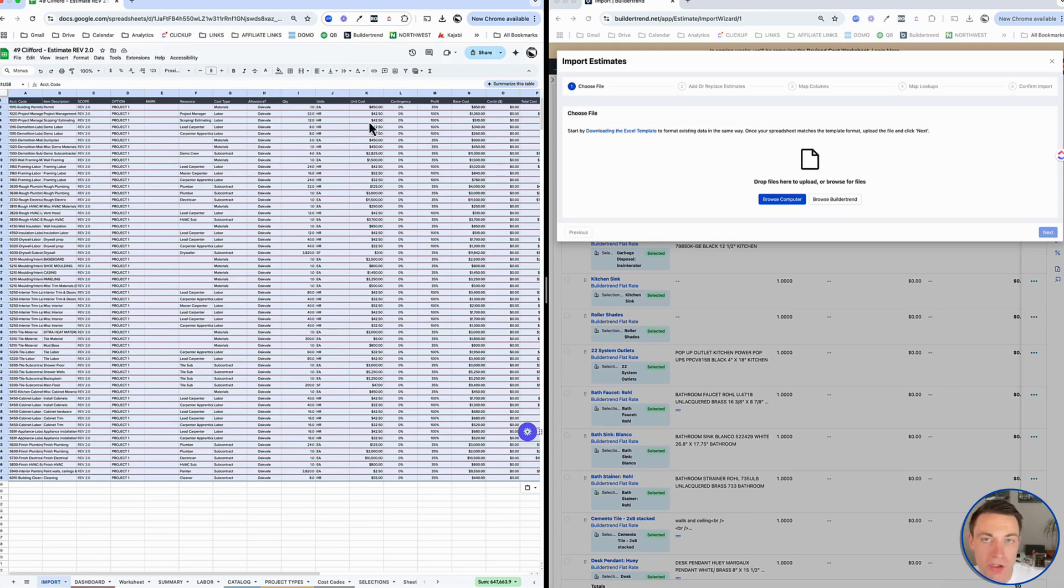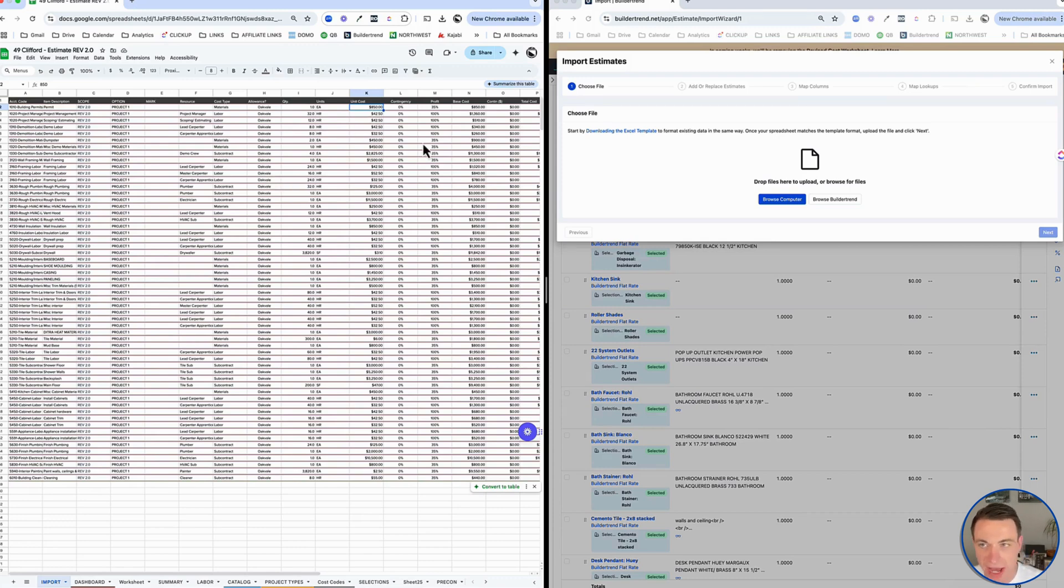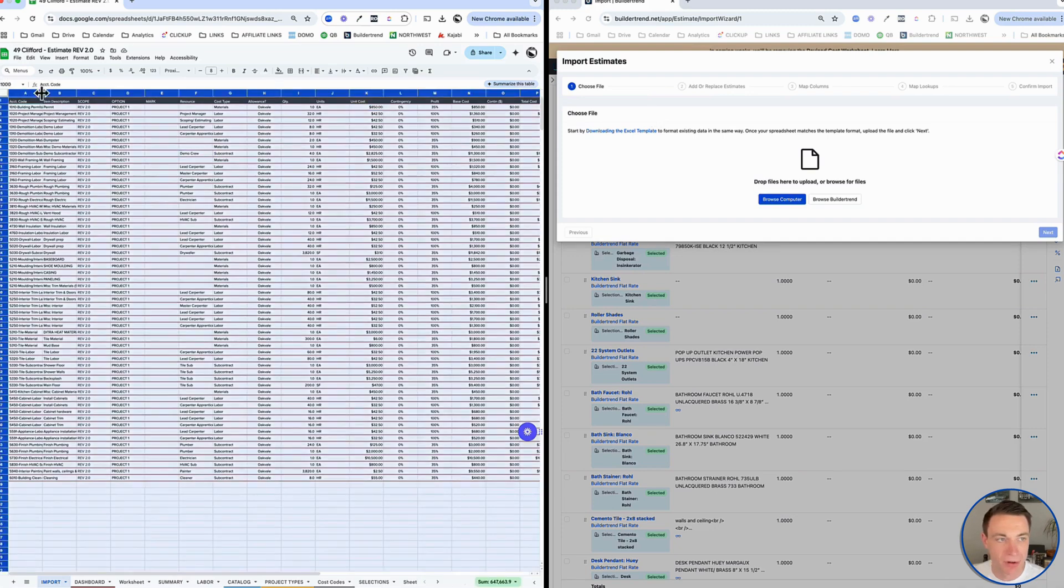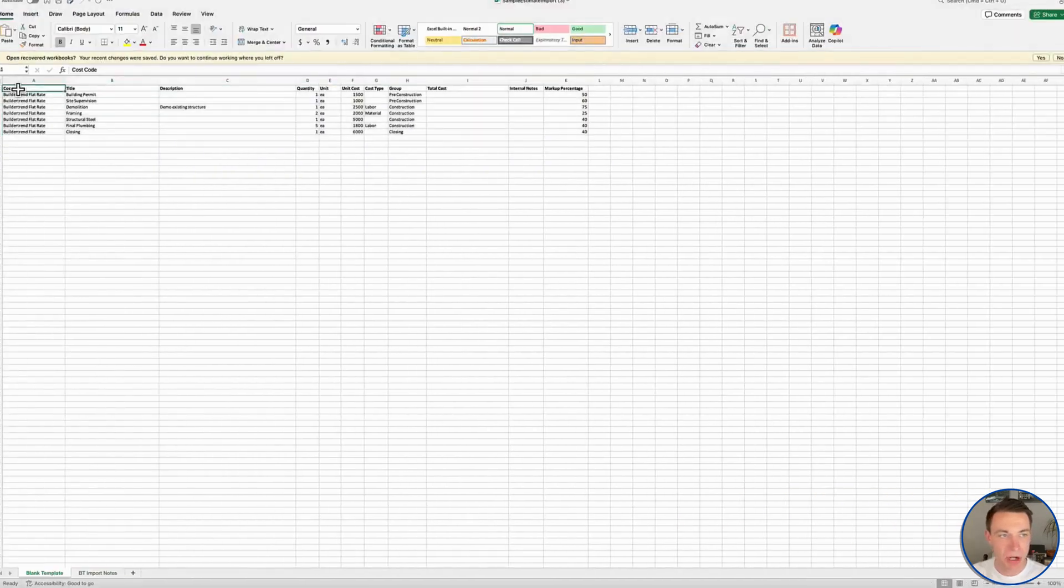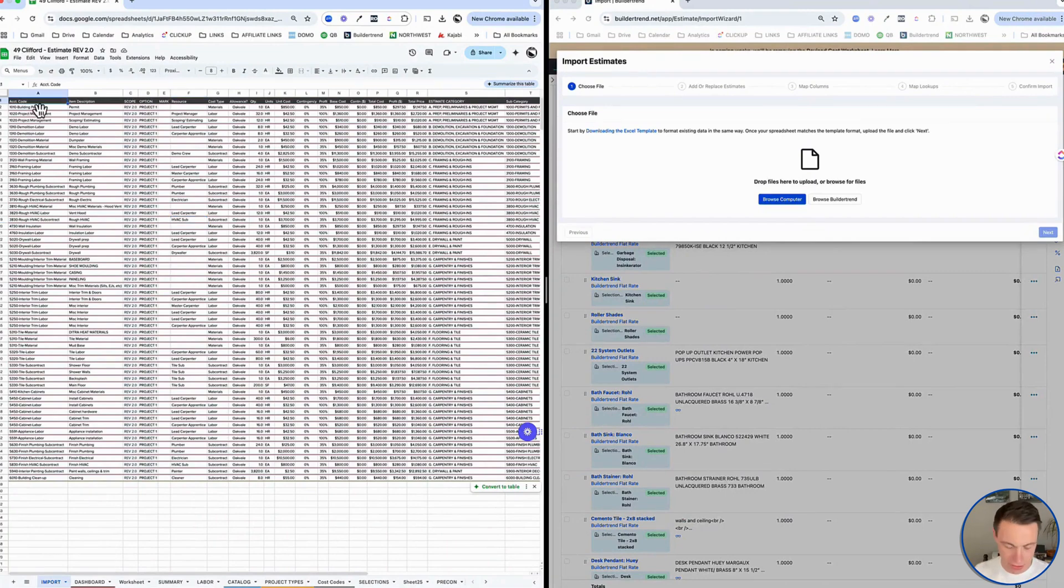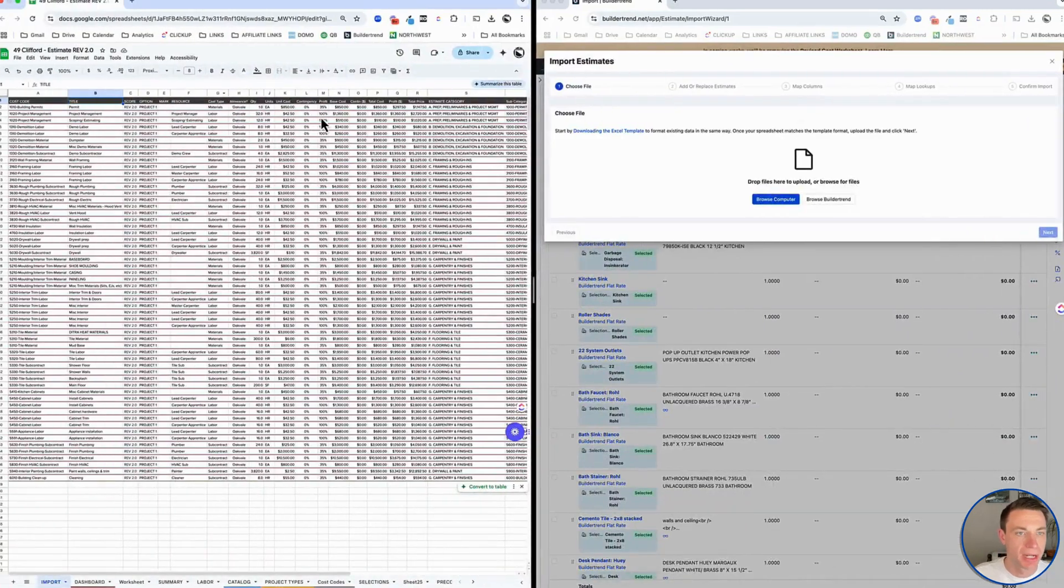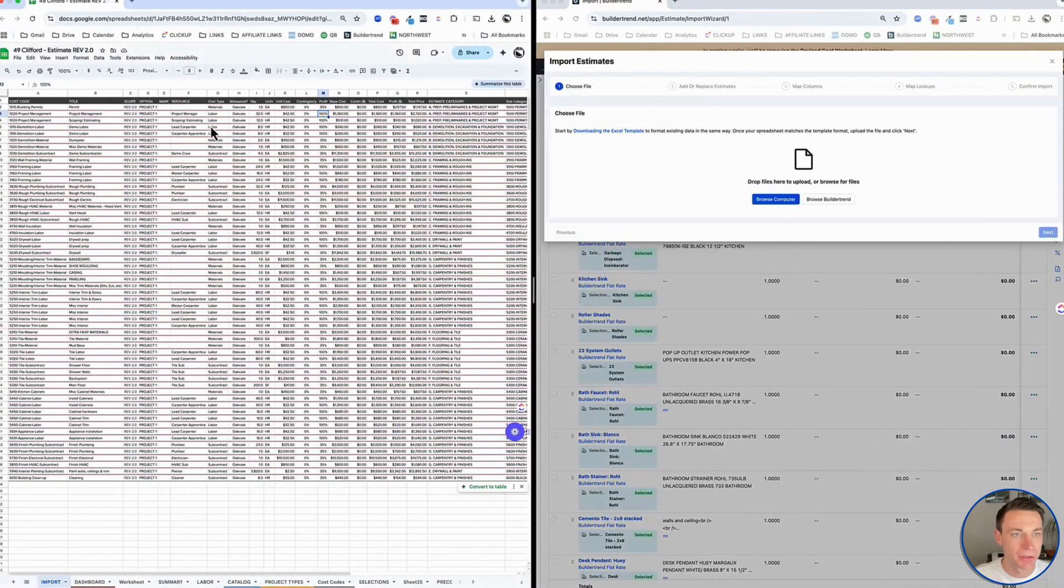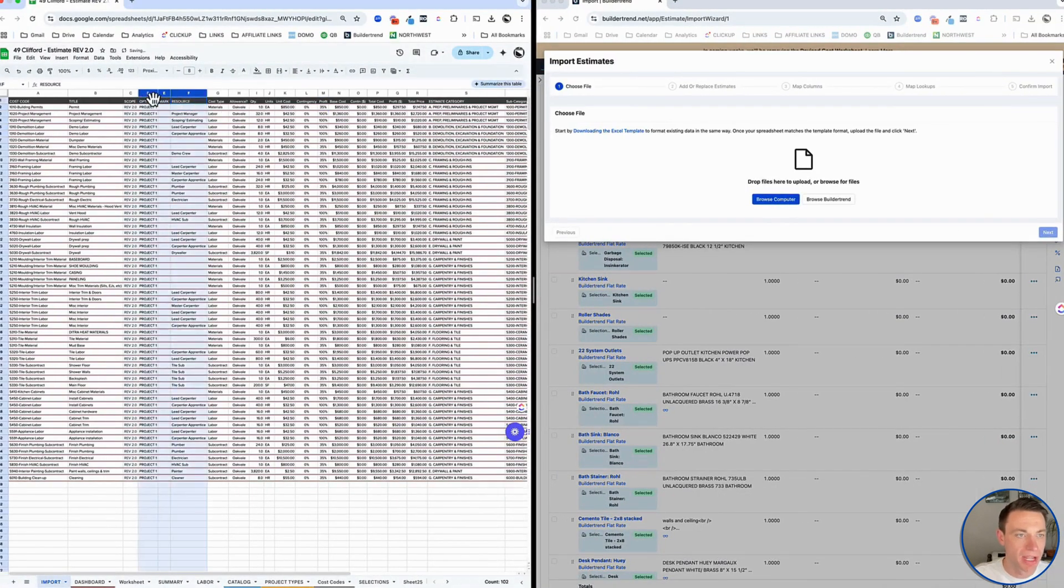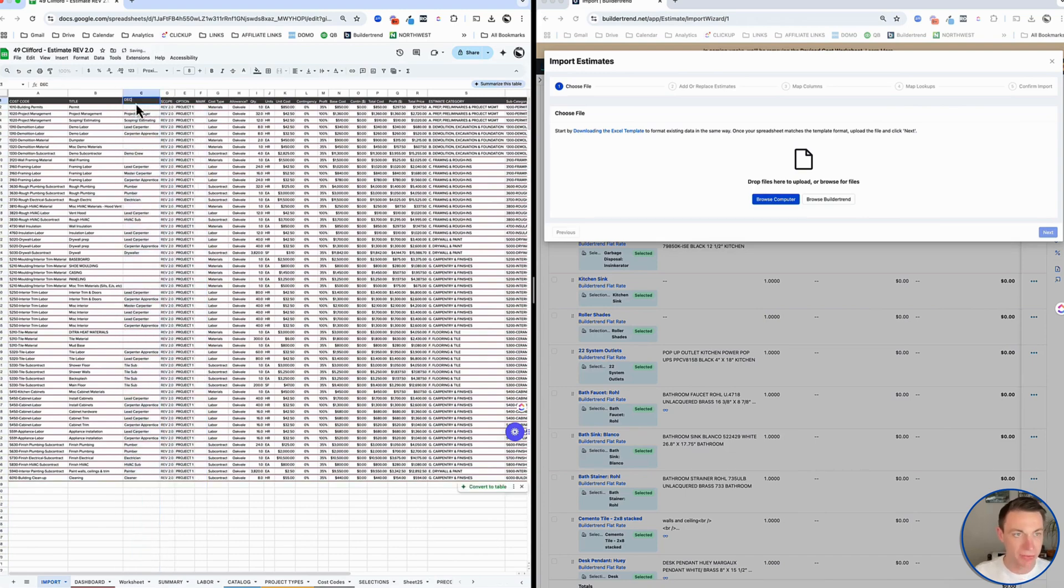We want to think about mapping our fields over. I've got accounting code. I'm going to change the name to be cost code. I'm going to bring in title as well. I don't really have anything for description, but I'm going to use my resource because they don't give me a resource column. I'm going to pull my resource over and change the name of that to be description so I get the information in there.